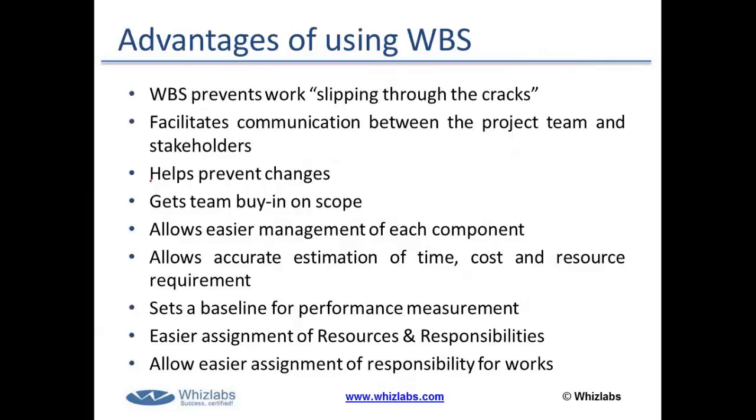Okay, there was another question. Can we say 1.1 is a control account? It depends. Let's say your project is being monitored and controlled only at the second layer of the WBS. So that is your control account. What do I mean by monitored and controlled? Let's say you are tracking the activities which are at the third layer of the WBS in order to find out if the activities are completed properly or not. So that becomes your control account.